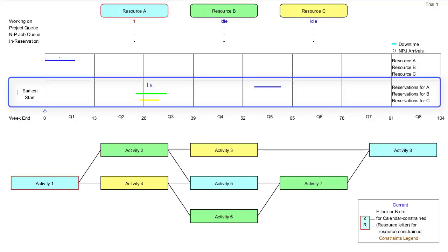The lower chart section is a plot of reservation periods. For a fee, we can have the resource block out periods so as not to start non-project jobs. Then one of our project's activities can start when ready. Shown are 3 reservations. I put in 1 for each resource.